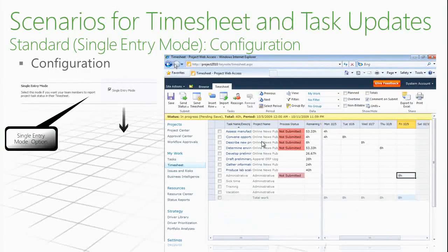But the page where you enter on the timesheet is going to show you this type of display, where you will have on the right part your timesheet based on the time period you have decided to use. And you will enter your unit of update. So in this case, it's hours there. You could have different things. And you will have tasks that are assignments, as well as non-project time at the bottom that are grayed out, that could be automatically approved or not. Okay? And that's part of the normal settings for the timesheet.